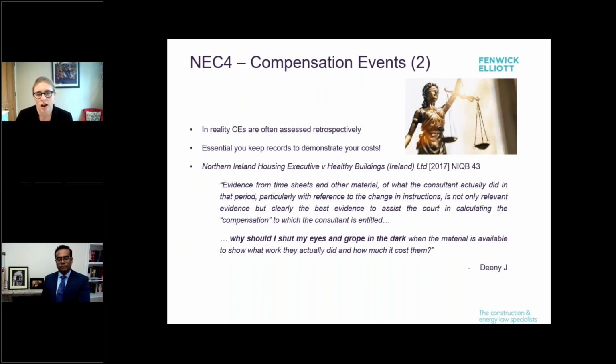In reality, CEs are often assessed retrospectively, especially if they're very high value and contentious, because people don't want to agree them, or they don't get round to agreeing them, or they're having arguments about proof and valuation throughout the project, and it ends up essentially being a final account dispute at the end of the day. So you need to keep your records to demonstrate your costs and to demonstrate that they have arisen as a result of that compensation event. Referring back to it being a forecast, at the end of the day it very rarely ever succeeds, in our experience, if you don't have actual records and you're looking in retrospect.